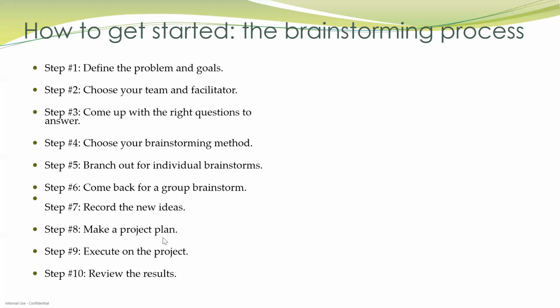Next important thing is make a project plan. Based on the outcomes of the brainstorming session, you can create a step-by-step project plan. This can include outlining the resources, the budget, deadlines that we need to have, the success metrics that we'll be using to gauge, as well as assigning the tasks or the responsibilities to your team.